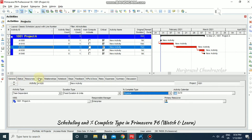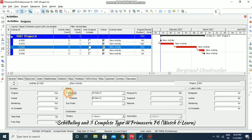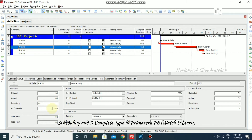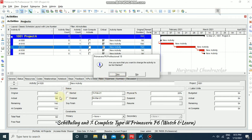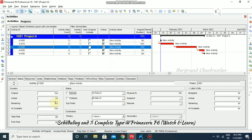Going to general and selecting physical completion type. If you start the activity and input any percentage, it won't update automatically — it updates manually. For example, remaining I'm going to put 14 days, and based on that we can schedule the project and get some float. In the physical method, unchecking start and confirming yes makes remaining automatically go back to 15 days.